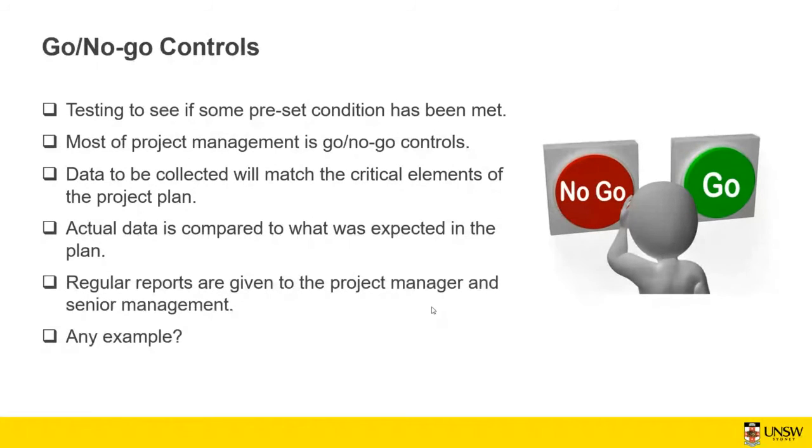Are you going as planned, or are you making major changes in the plan, or just stopping the project? The data to be collected will match the critical elements of the project plan. So again, so far has the scope been completed or not? What about the schedule and budgets? And using the earned value analysis, you compare what you have so far to the plan.